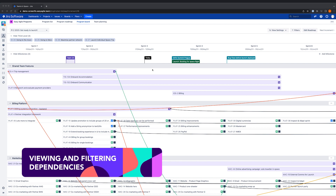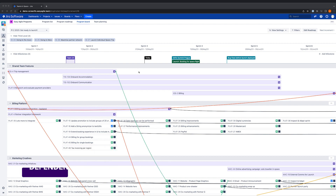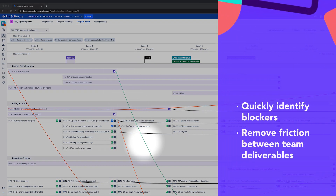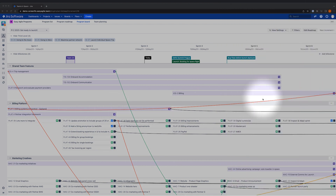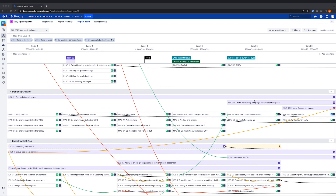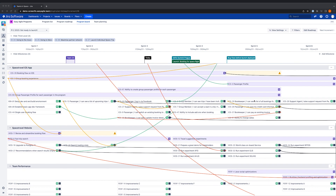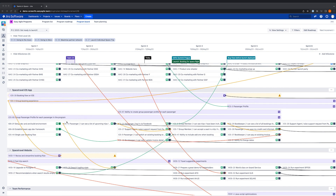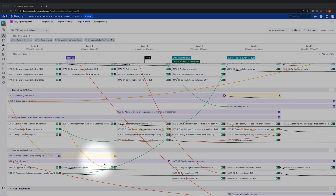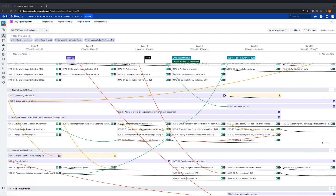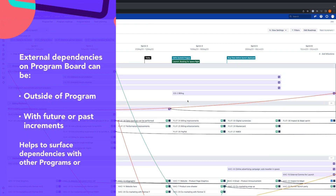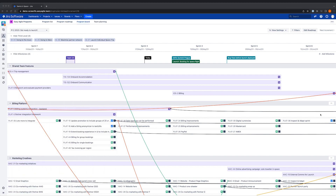In Easy Agile Programs, it's really easy to see dependencies or risks from the program board view and the health of these dependencies. This visual tool helps product managers, scrum masters and release train engineers to quickly identify where there is an impediment to work progressing and to remove friction between team deliverables during planning, the PI planning ceremony if we're practicing SAFe, or once work is in flight. Programs makes dependencies more identifiable by their colour, which indicates the health of the dependency. Green means our dependency is healthy, orange means it's at risk, red indicates there's a conflict, and black tells us that we have an external dependency. External dependency lines represent dependencies outside of the program or agile release train, or with a past or future increment that's not in our current view. We know from customers that not all risks or dependencies exist within a single program or agile release train, so it's really important that these are equally clear to see.